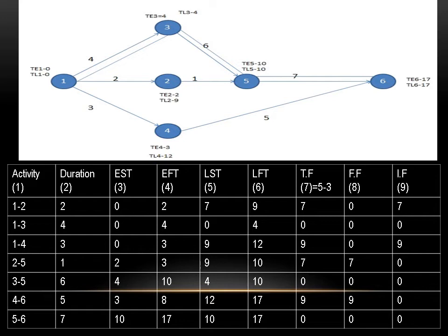Now LST, latest start time, and LFT, latest finish time. LFT is TL, that we write in the diagram. LFT is TL in the diagram. You need to remember only these 2 points: EST is TE in the diagram, LFT is TL in the diagram.